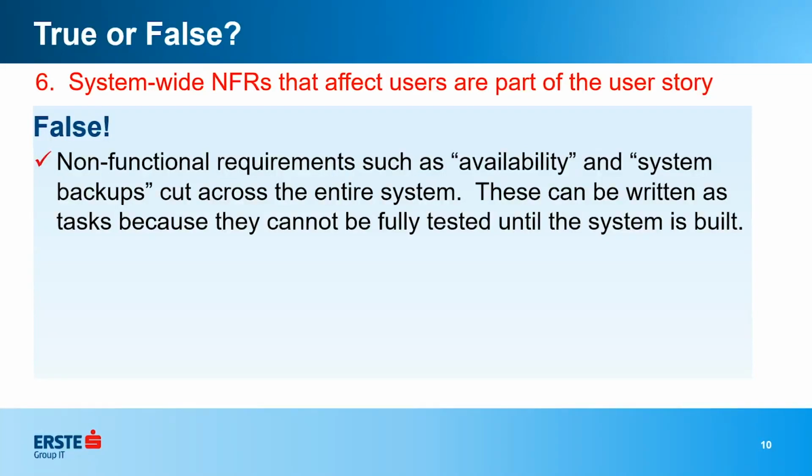But anything that's written in the story as acceptance criteria should be able to be tested by your team and not somebody external. That way you prevent yourself from not being able to complete stories because the other team is really busy, they have a backlog or whatever.